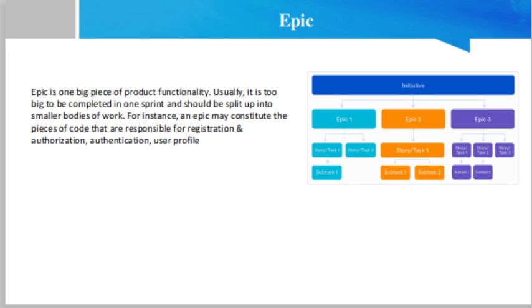It's also worth mentioning that if there are several types of users for one feature, for example, logging in as a user and logging in as an admin, separate stories should be created for each of the roles. Ideally, all user stories have to be written in a standard format that goes as follows. Using consistent wording is important because the template allows you to simultaneously focus on the end user and provide programmers with guidelines on the features to be developed.